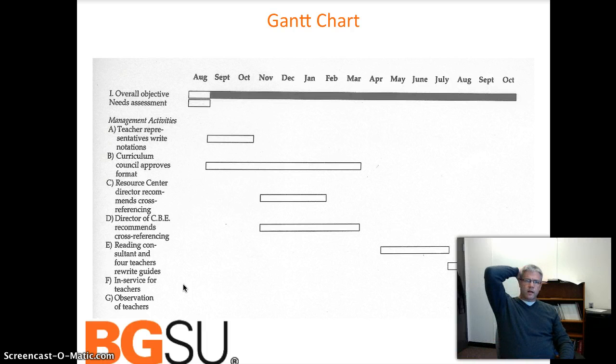The Gantt chart is really a timelining chart. I'm most familiar with these. This is almost a standard way in which building construction projects are outlined, so that we know when concrete's coming in, and that as soon as concrete's done, the steel work can begin. But while the steel work's going, we can also be doing the electrical undergrounds, and so on and so on. So you get to see and help coordinate on a calendar who's doing what when and what needs to happen.